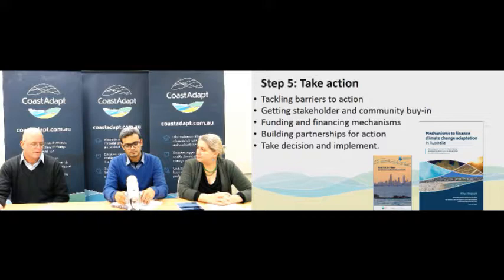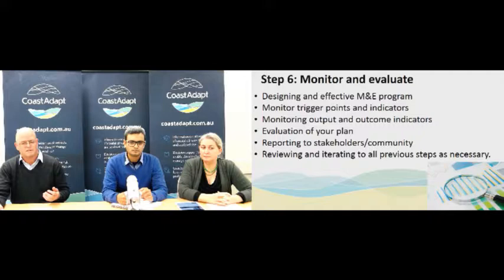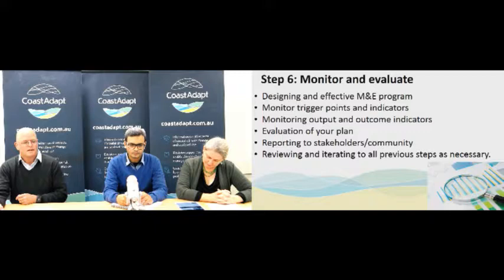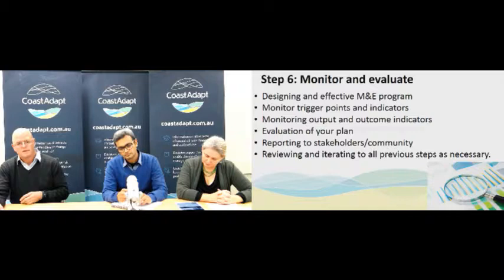The final step is monitoring and evaluation. Always looked at as the final step, but often some of the most important steps. You need to develop an effective program. You need to monitor those trigger points and those indicators that we identify in our plan. And we also need to think about how we determine over time, not only the outputs, have we implemented something, but what are the outcomes? What are we achieving from this over time?